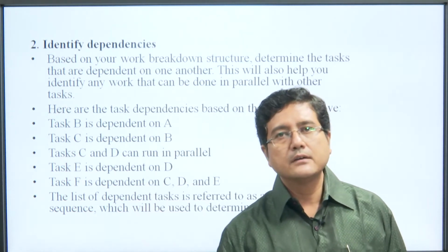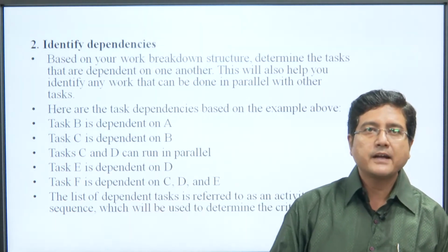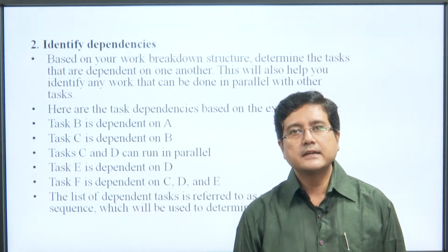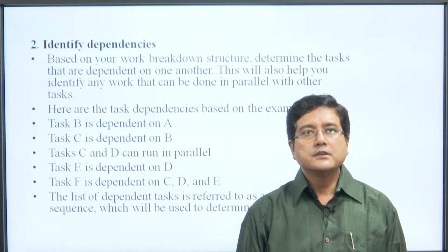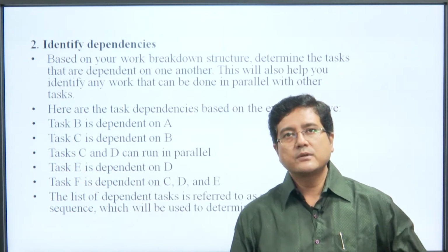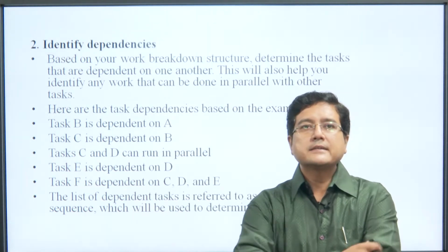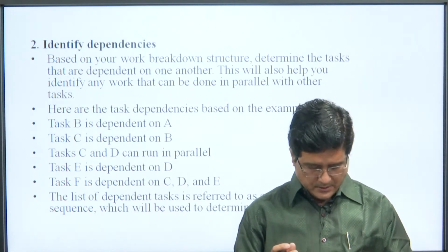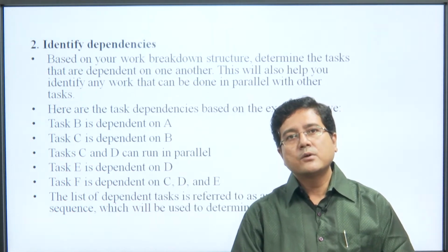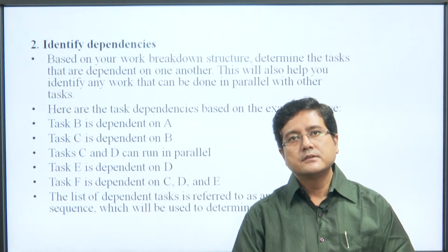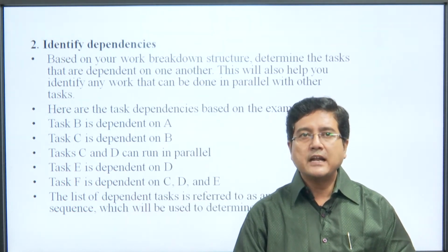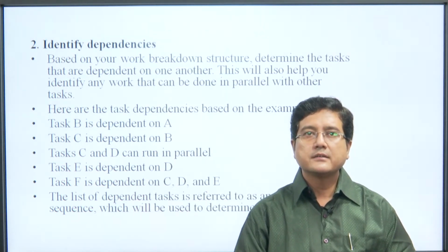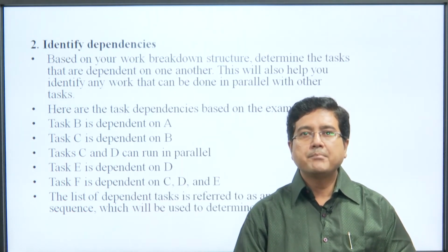The second step in CPM is identifying dependencies. Based on the work breakdown structure, determine the tasks that depend on each other. This will also help you identify any work that can be done in parallel.